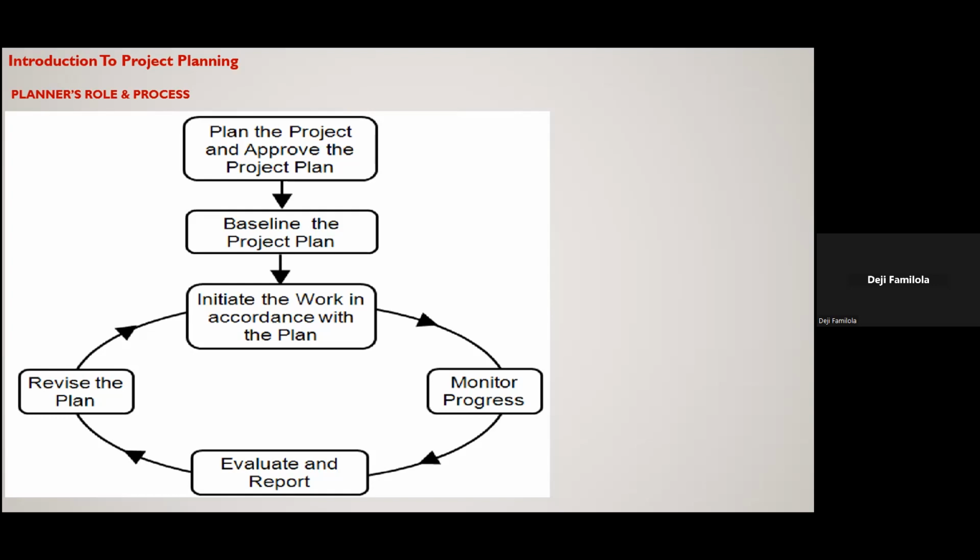The project manager has the power to authorize it and make that change. But in some cases, they will say, well, that needs to go through the change management board. They need to look into that. And the change management board, you are part of it as a planner. So you are involved because you will be the first person they ask when they want to analyze. They will ask, please, can you provide us a scenario plan or impact analysis? What causes this delay?